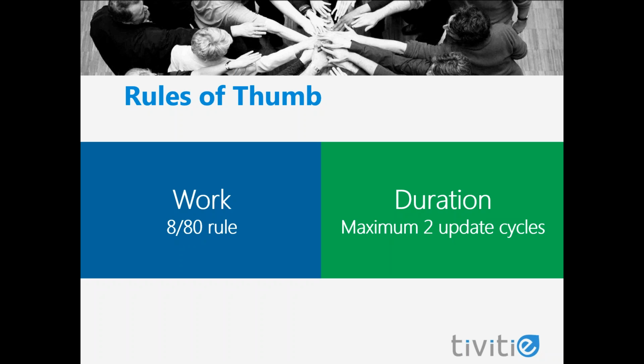It's really common for a task with a long duration to be reported right on schedule all the way up until just before it's supposed to be finished. People always think they're going to be able to catch up. If we break our tasks down into smaller measurable pieces, potential issues can be seen earlier, and we'll be able to catch them before we've really slipped the schedule.